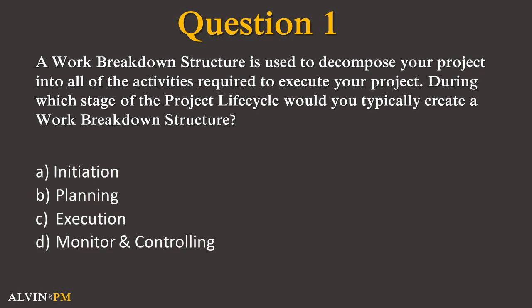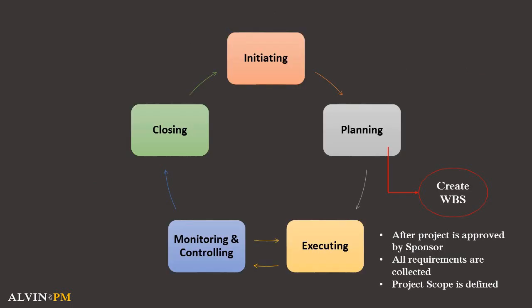So which answer did you choose? If you selected B, then you are correct. The WBS is created when you're in the planning process group of your project, after you've worked with your team to define the scope of your project as well as collecting the requirements of your project.